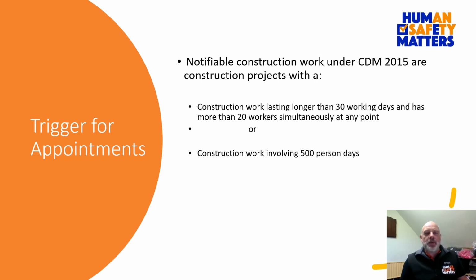My advice to you would be, if you have a project which is on the cusp and not sure if it's going to be notifiable or not, then just notify it. Because what you have to do is no different from a notifiable project to a non-notifiable project. The only thing is that the HSE know that you're actually going to do the project. So there's nothing more to do or nothing less to do by not notifying it accordingly.